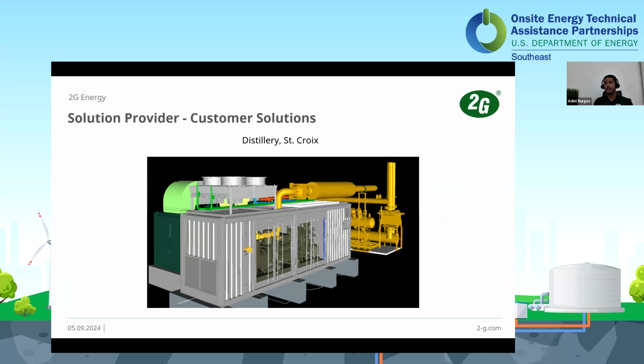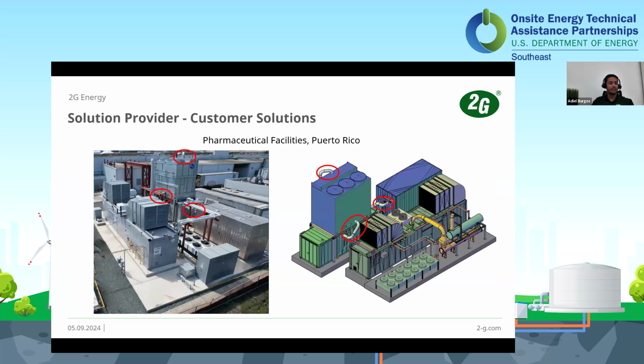This is some of the design. Obviously, this helps the customer visualize their installation and request some changes. And the one I want to spend some more time on, I'll try to move quite quickly through this one. It's another pharmaceutical system. The red dots in there are the on-site work we had to do for piping configuration. Everything else was pre-assembled and pre-tested in Germany, which obviously helps with the installation and commissioning, and it makes the on-site commissioning so much easier.